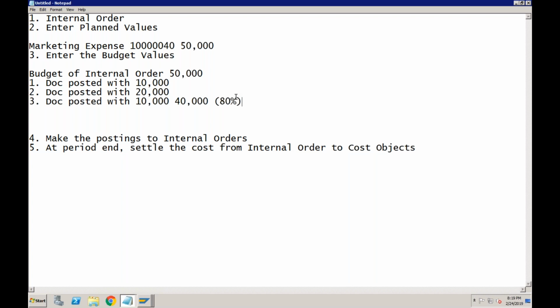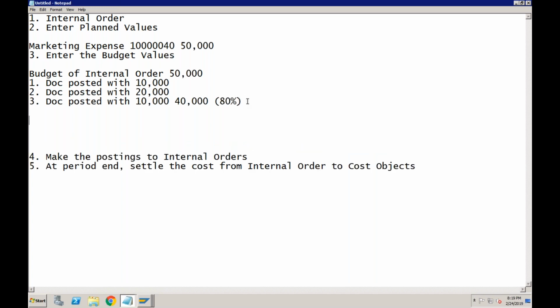So that you know now I am running out of the data. So similarly, I am running out of budget. So if you want the system that whenever I reach 80%, provide the warning message. It will just be the warning message. It will not stop the user. It will just tell them that 80% of your budget is over.